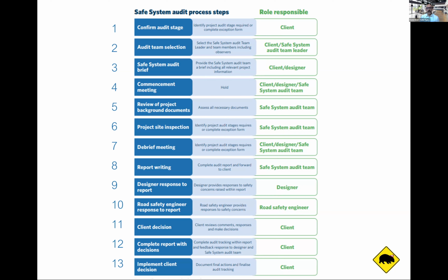And the answer is no, you don't include that whole prompt list out of the back of the Austroads Guide to Road Safety Part 6. We don't want to see that added and included at all. That is there to prompt your thinking only, just thought starters, ideas, things to look at. You just submit the template that Wakatahi provides and that you're using now, filling out your safe system assessment matrix and all your issues. Good question.